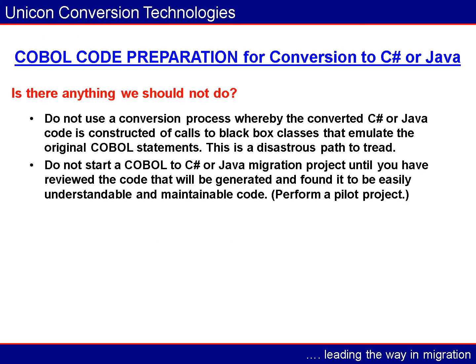Do not start a COBOL to C# or Java migration project until you have reviewed the code that will be generated and found it to be easily understandable and maintainable code. The best way to undertake this due diligence is to perform a small pilot project.